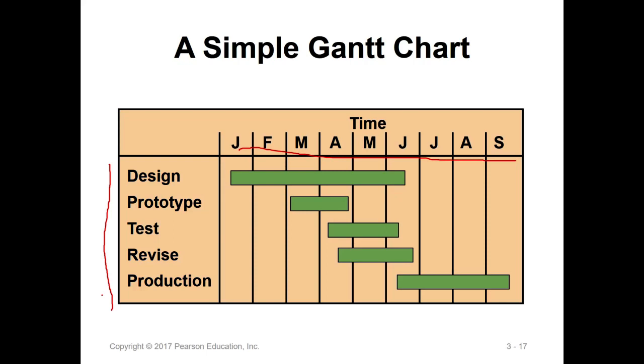See, why do they have overlap over here? Because even though you revise your drawing, there is still some small chance in the early production stage that we catch some flaws, we catch the errors, then you want to go back. But of course, we want to reduce this possibility as little as possible. Once you release the drawing, you already ask the tooling people to make the tools and purchase the materials. And then we started the production process already. You found out we made some mistake. Unfortunately, you wasted some money. So we want to reduce this overlap time, but that's the reality when you plan the project that you need to consider and think about.